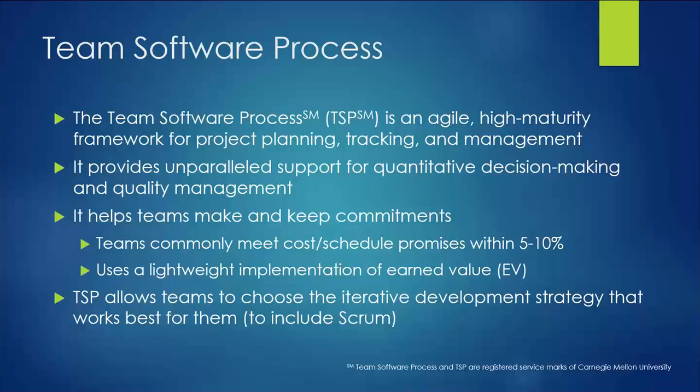One of its deepest strengths is that it really provides some great ways for teams to make and keep commitments. It's very common for teams using the team software process to be able to commit to deliver within cost and schedule on their promises to within 5 or 10% error. And it does this by giving teams access to a very lightweight implementation of an industry-proven concept called earned value management.